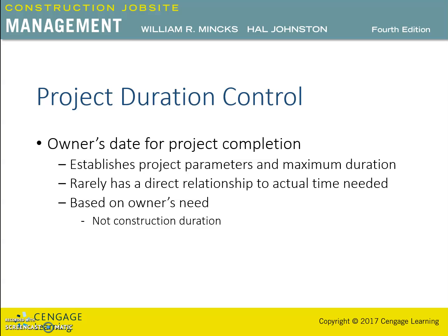A school project will be required to be completed in July or August, allowing time for equipment move-in so that the facility can be in operation in early September at the start of the school year. A retailer will want its facility completed in late summer to be able to stock goods and train personnel prior to the holiday retail season. These completion dates establish a maximum construction duration, but the contractor may be able to complete the facility prior to the completion date.